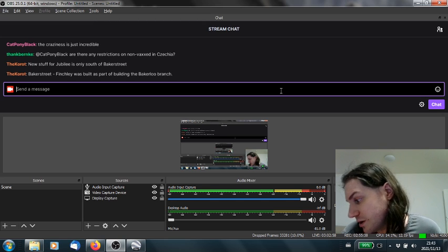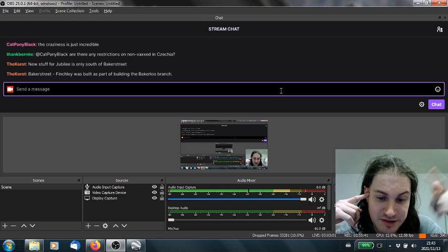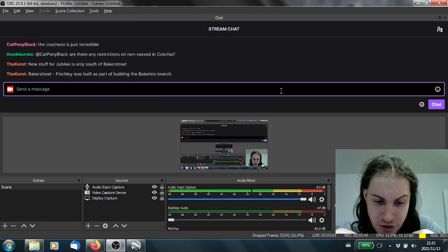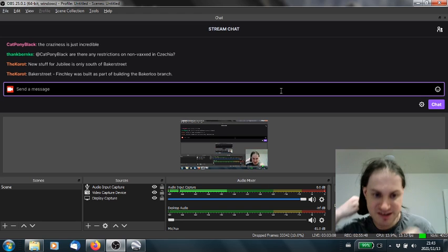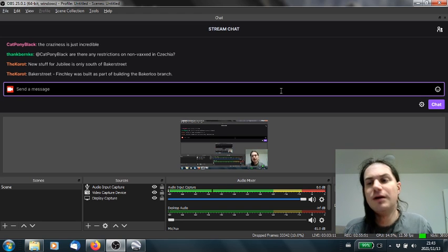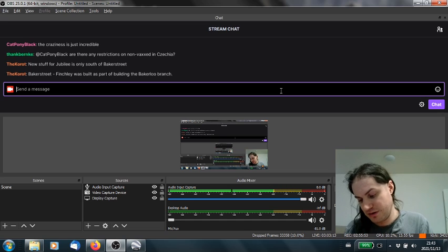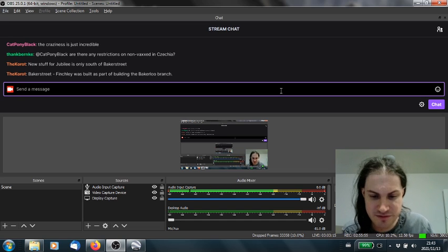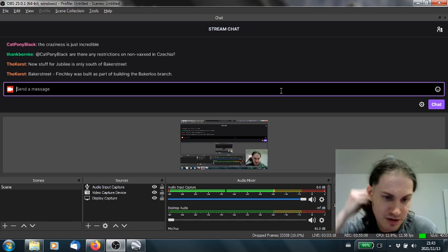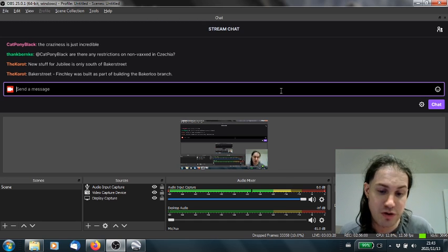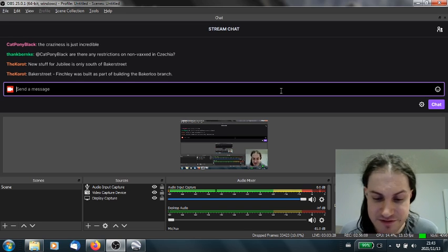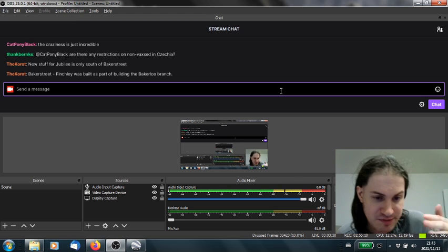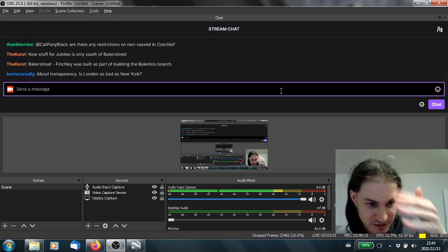The intangibles in New York, I was told the procurement stuff doubles the cost. There are other things that raise the cost in New York. New York is not 2x, it's more like 6x, 8x, 10x. But I was told that procurement alone is about a 2x cost raise just because of weird New York issues with the contractors. There's this idea that working with the state is so difficult that you always include a premium. It's not a 2x premium, but that premium plus rest premium plus whatever.